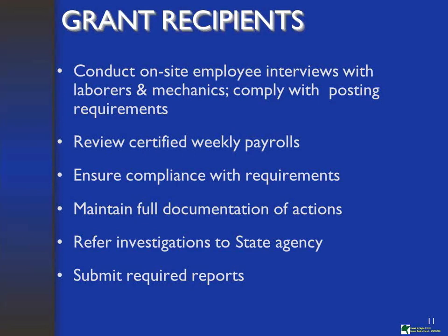It's probably impossible to do that on very large projects, but had he been one of the randomly selected persons, and you come back and match it up to what was reported, then it would have been a red flag that would have alerted us to say, something's not right, let's dig deeper, or let's package this and send it to the Department of Labor for review. So those kind of things do marry up, the employee interviews and certified payroll reporting.